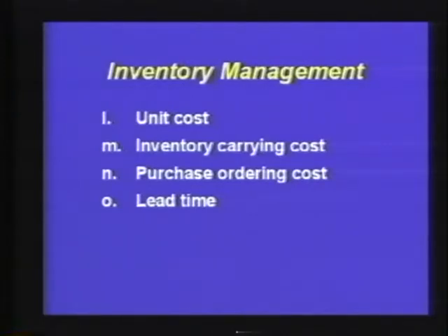The lead time in the inventory management system is what we call aggregate lead time, which is the pre-purchase order time. It would also include maybe the purchase order time, the vendor lead time, transit from the vendor to me, receiving inspection lead times, and the lead time that it takes to actually put material bin on hand.